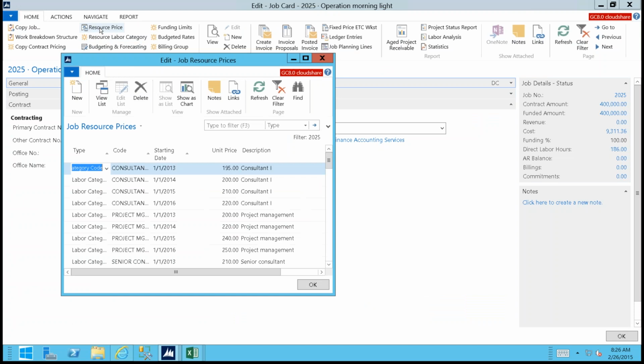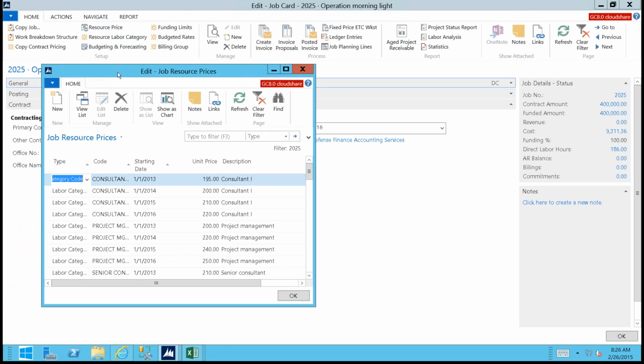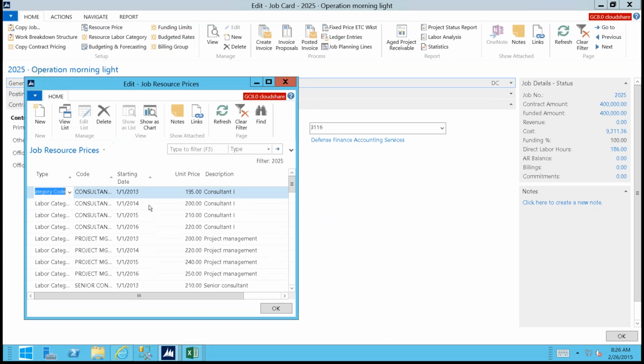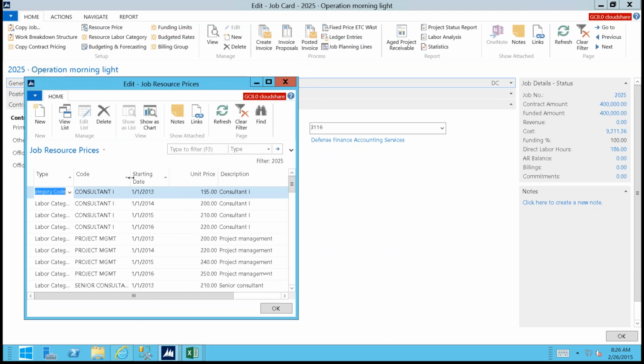So under resource prices, you're going to see the full history of what our T&M bill rates are. So this is going to be by project. So this is particular to project 2025 by labor category and effective date. So this is something a little bit different than some of the competitors out there. So by giving you the bill rates by labor category and effective date, if you have a multi-year T&M project, you don't need to worry about going back and updating the rates when the date changes. So I can just have them set up once, and the system's going to automatically bill the proper rate based